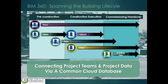Here is a breakdown spanning the lifecycle. Docs goes from pre-construction right through to commissioning and handover, storing all digital information, providing version control, redlining and markup, sheet generation, sheet extraction, title block verification, and access management. Glue handles multi-discipline coordination, coordinating models across disciplines, doing preliminary clash detection, and moving information back and forward to ensure the model reaches the right maturity level. Plans kicks off towards the end of pre-construction where you schedule how the project will be brought to site — scheduling, task management — and passes information on to Field.